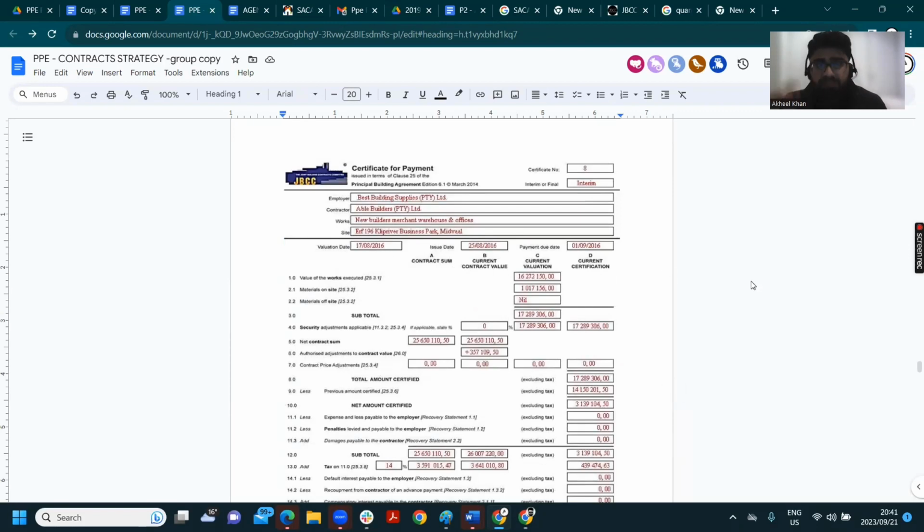So that's the date the person actually went to the site, right? That's you, the principal agent, going to verify the works. You can see here from the 17th they went all the way up until the 25th. So that's a whole host of days, almost a week later, that they have now issued the actual certificate, from the 17th to the 25th. Then you can see 25 plus 14 will give you the 1st of September. And that's the 3 dates I was just talking to you about.